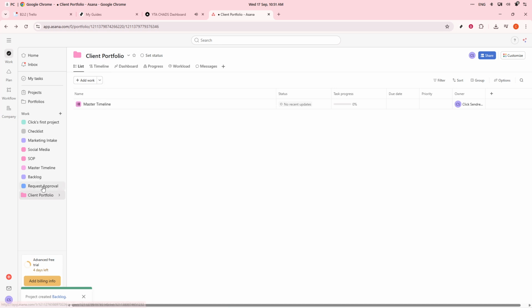Managing internal team workflows becomes effortless when using Asana. Assign tasks smartly to your team members: writers, designers, strategists, and ad managers. Employ custom fields to track necessary metrics like client name, channel, priority, and status. Moreover, workload view aids in balancing team capacity, ensuring tasks are evenly distributed.